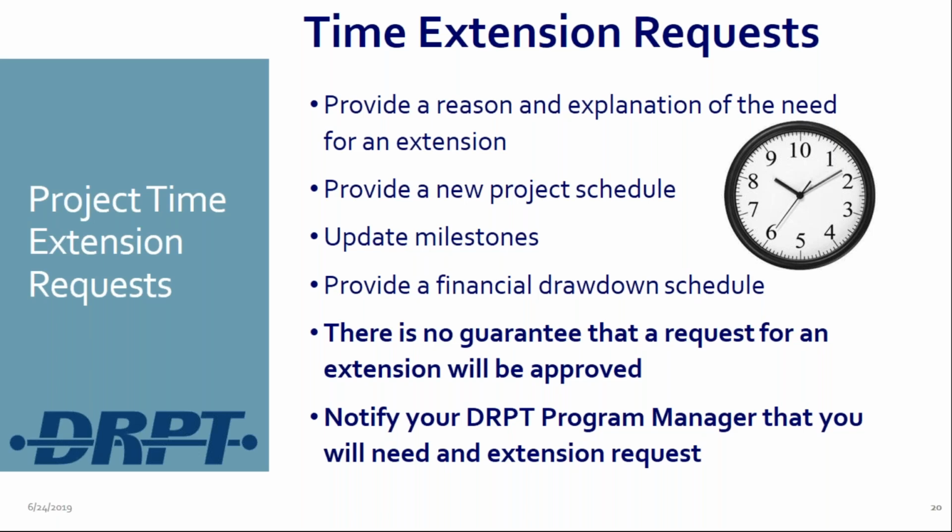which I think you already did. So again, time extension requests should be submitted in Olga. Requests should contain a detailed explanation of the need for a time extension with sufficient information for DRPT to make a decision. So in this instance, less is not more. The more information you can give us, as long as it is relevant to the request, the better.